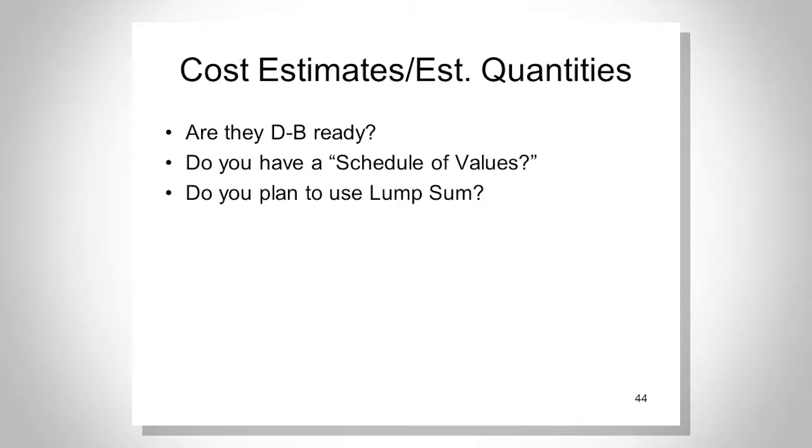With design build, you use schedule value, which is 10, 15, 20 item schedule values, which everybody commonly puts down as lump sum. Well, lump sum is good for a number, but you still need to put in some level of quantity to get it to eventually relate to your material sampling and testing to show that frequency. So the bidding for lump sum, based upon schedule values, is used to get that finite number, give you a collective number, which will roll into your low bid number for evaluation of low bid, but you still need to have a subset of a breakout of quantities.